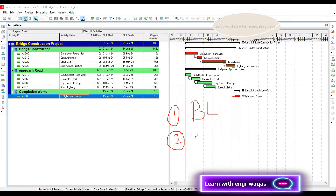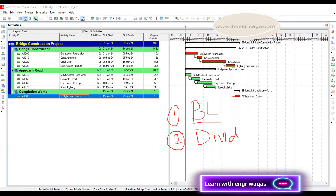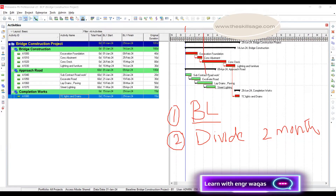The second step is to divide this baseline — our project schedule baseline. Consider a timeline starting from January and ending in June, which is six months. We divide this timeline into fixed windows, agreed upon between client, consultant and contractor. In our scenario, each window will be two months, giving us the first window, second window, and third window, and we conduct the analysis separately for each.